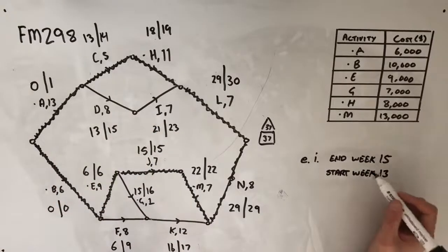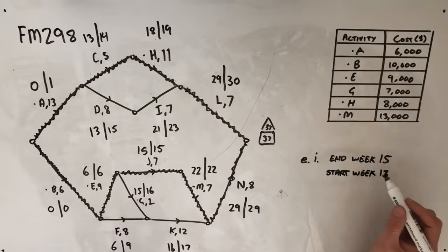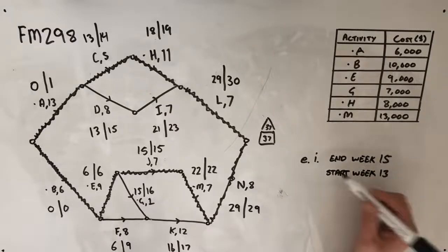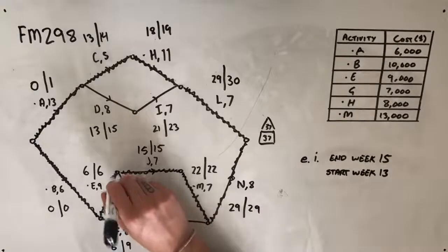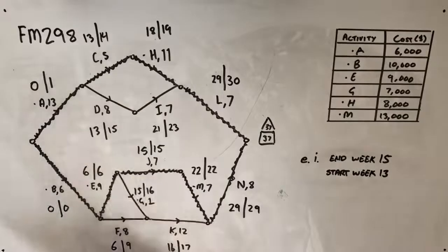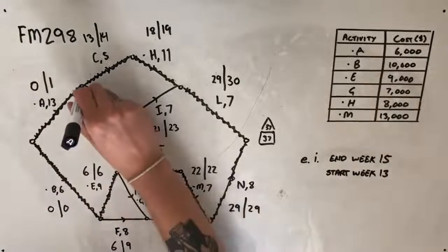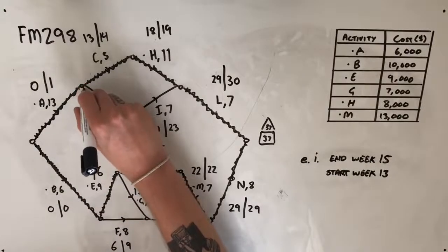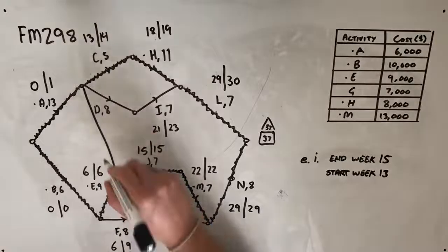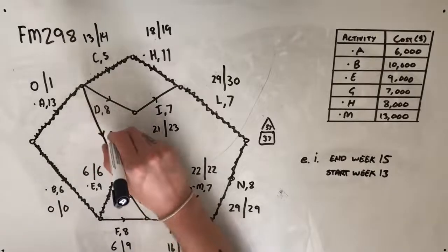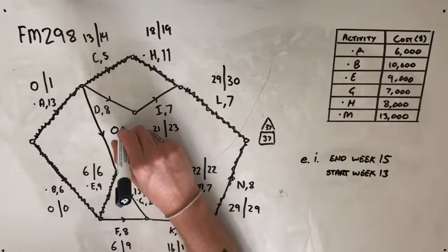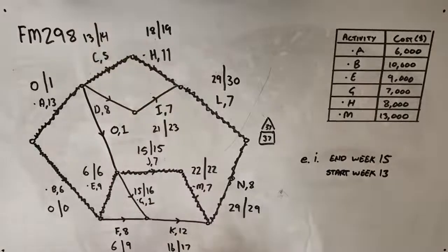And the only place that could connect to week 15, and it has to end on week 15, is down at this vertex here, which takes 15 days to get to. So I'm going to remove the earliest starting time and latest starting time for D, and activity O on your graph should travel straight between those 2 vertices, and we can put it in like so.